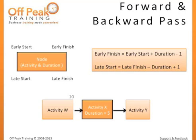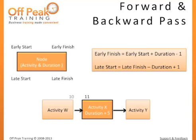Early start represents the earliest an activity can possibly begin based on all of its predecessors. For example, if our node depends on an activity that ends on the 10th day, our node's earliest possible start will be the 11th day. Early finish represents the earliest an activity can possibly finish, based on the early start of the node and its duration. It can be calculated using the formula: early start plus duration minus 1. For example, if our node has a duration of 5, we add 5 to 11 which gives us 16. Since the task will not finish at the beginning of the 16th day, we subtract 1, indicating that the task will finish at the end of the 15th day.